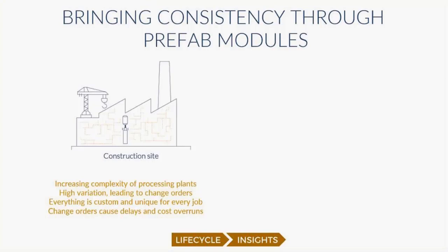There's a lot of variation that you have on the site, and then, of course, everything is custom and unique and different. So it's the first time a lot of companies are doing it, are actually installing this type of equipment. So all of that is leading to a lot of change orders at the site. And I'm sure if you've been involved with this industry, change orders are not good in terms of trying to keep on budget and trying to keep on time. So that introduces a lot of cost overruns, a lot of delays in the schedule, and that's bad for all